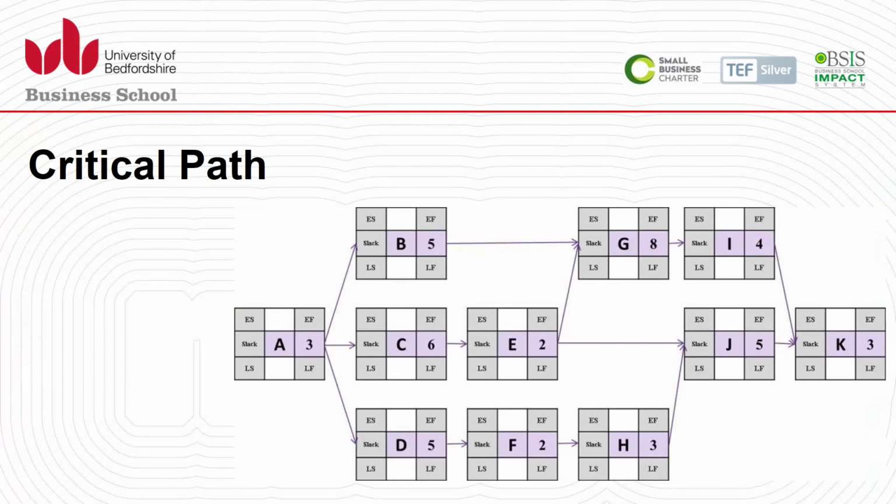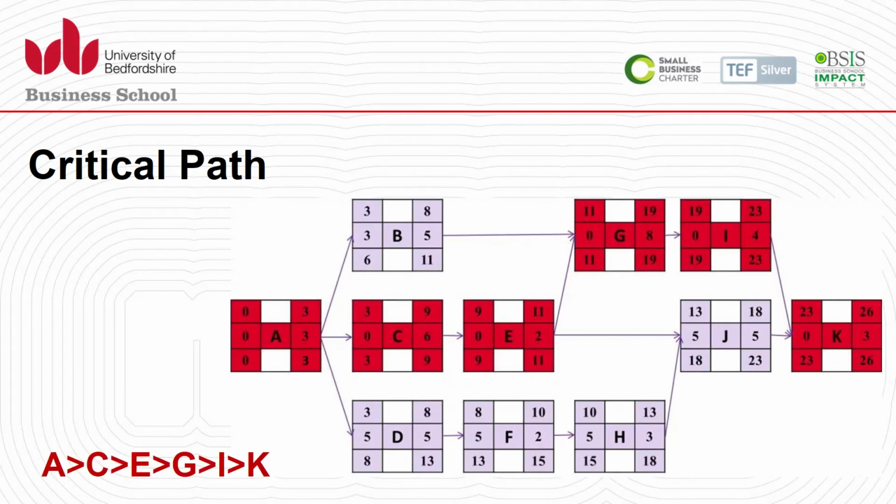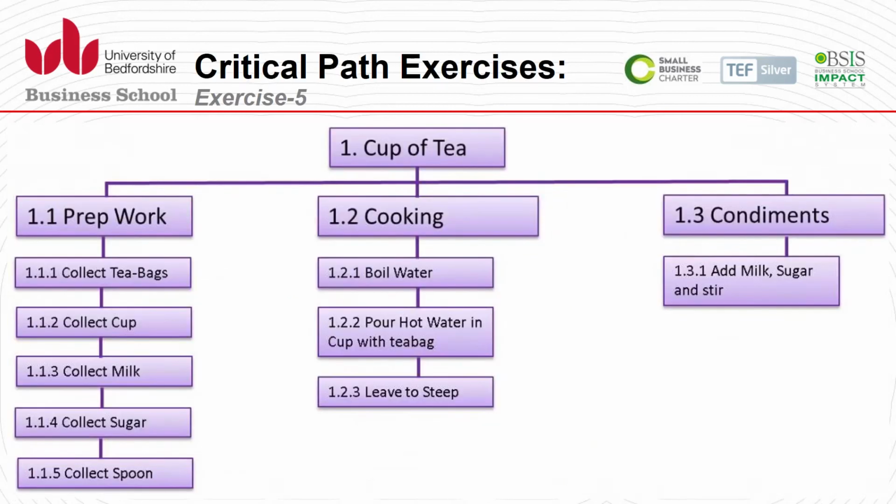And if you apply this, from the table it will look like a network diagram, and then you do the forward path and backward pass, and then you can find the activity with zero float or zero slack. These are the activities with critical nature, and the activities lying in this path, this is called the critical path of the project. I hope this makes sense.